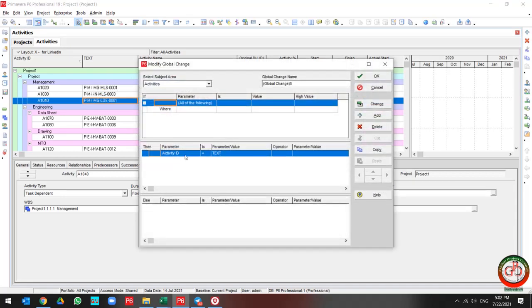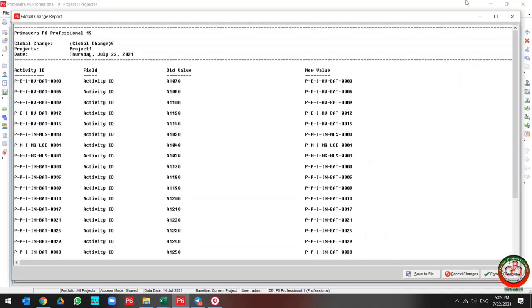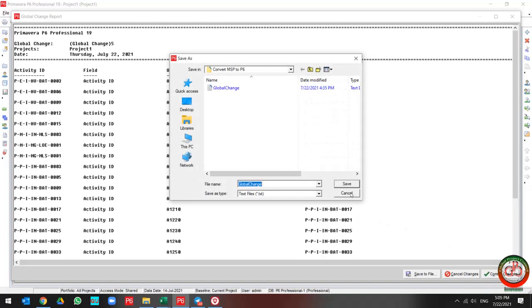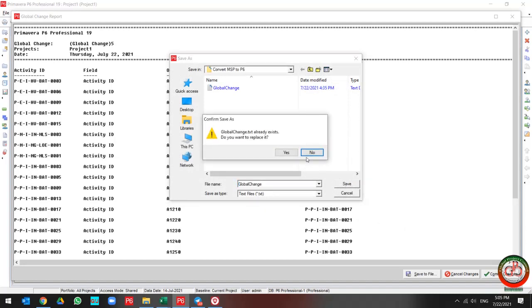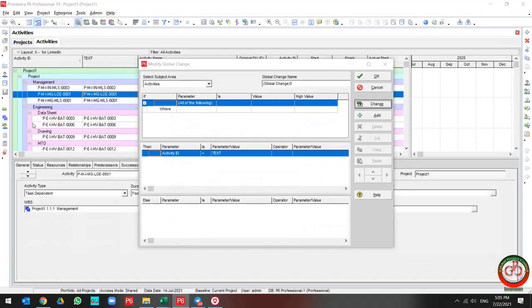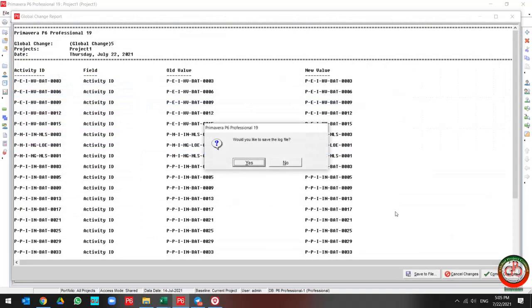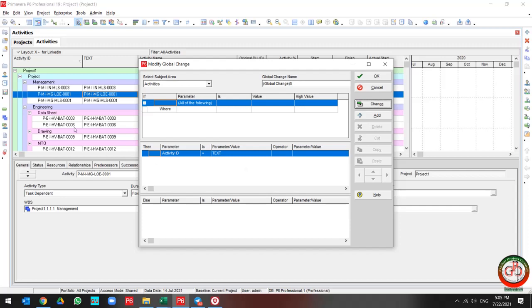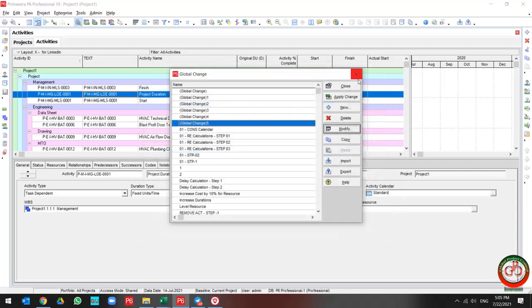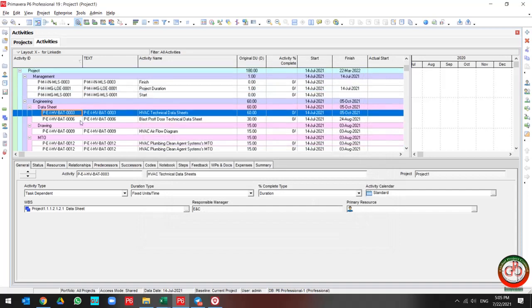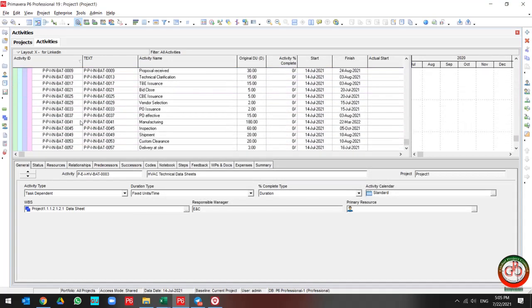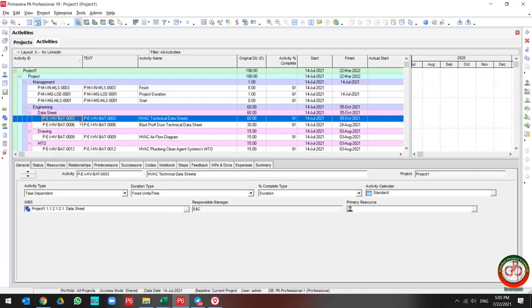I need to run the global change in order to update the activity ID based on my requirement. Like the previous one, my activity ID is equal to the text. In this stage, Primavera P6 is going to be showing me the changing log. According to this log, these are my old values and this is my new value. If I press to commit the change, then all activity ID is going to be changed. Like this. And my project is completely in my hand in my Primavera P6 software.